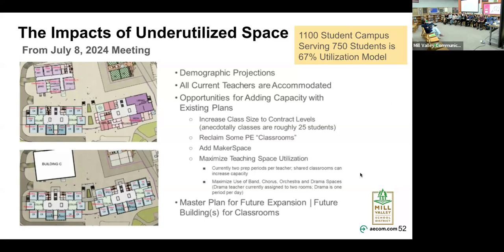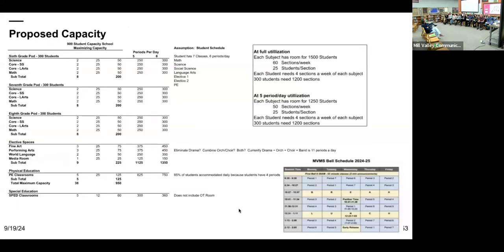So Ryan has his own kind of technical data. In my world, this spreadsheet is kind of a capacity study for how we might look at reduction in capacity. We believe that a reduced scenario for the 718 students that are currently here, we could reduce the project by 8 to 10,000 square feet, and therefore save some of the dollars associated with that. That would remove approximately 6 classrooms plus some circulation and supporting spaces.